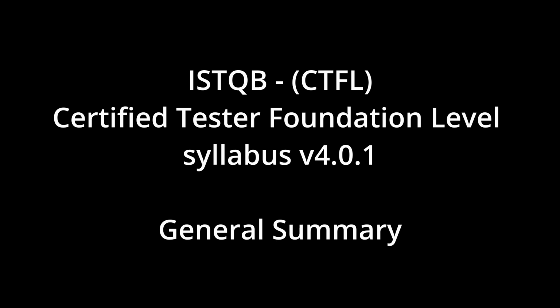Yes, there's three-point estimation where you get optimistic, most likely, and pessimistic estimates for a task, and you use a formula, like PERT, to calculate a weighted average or determine a range. And Wideband Delphi is a more formal expert consensus technique involving multiple rounds of anonymous estimation and discussion among experts to converge on a more reliable estimate.